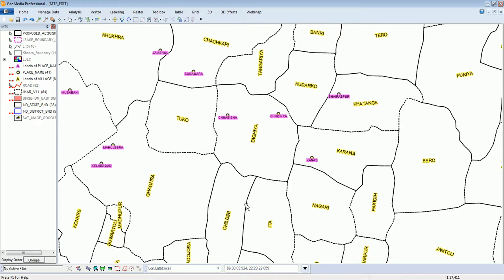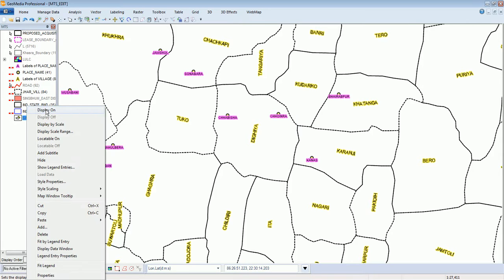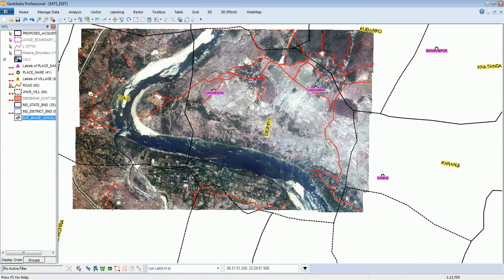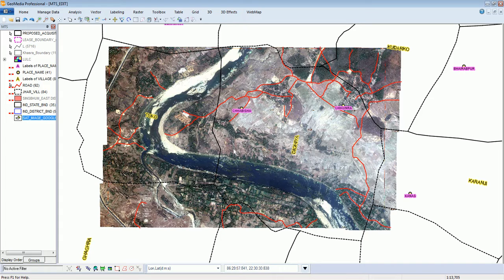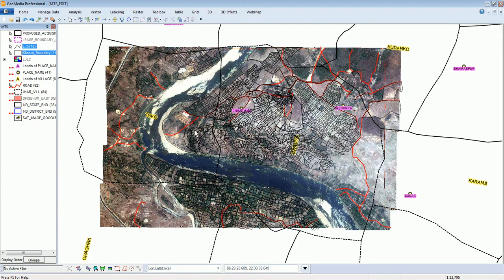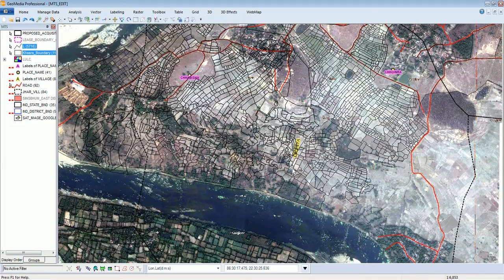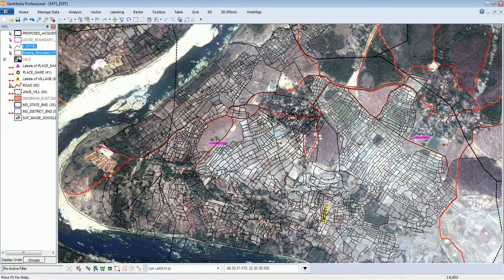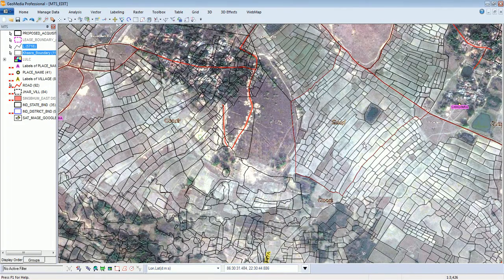For land acquisition in mining areas, first we need to acquire the satellite image. We have acquired the satellite image for this area covering almost the whole Diggia village. After acquiring the satellite image you also need to geo-reference it with all administrative boundaries, and you need to have the plot boundary maps collected from the land records department. This is the plot boundary map — it's a scanned copy that has been geo-referenced, or you can rectify it with DGPS land survey. These digitized plot boundary maps are also linked with the ROR information in the backend database, so the plot boundary graphics are linked dynamically with the ROR information.